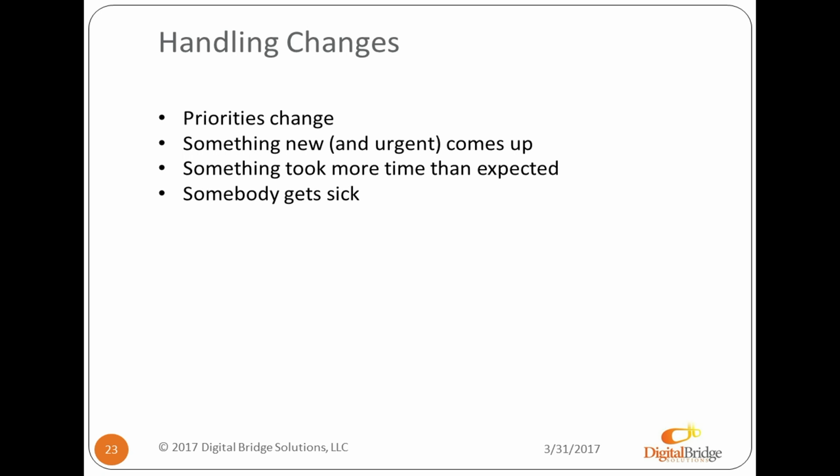Handling changes. Difficult for our organization, just like any others, but we have a process for that. So sometimes priorities change, which we touched on already, or maybe there's an outage on one of our client sites, or maybe that launch you had scheduled for Wednesday took an extra 2 hours, or somebody gets sick. There's an impact to each one of these changes. And from a PM standpoint, you need to keep all the boards in mind and know how, if something has changed over here, that's going to impact resourcing and timeline for your other projects, which also means you need to know priority. This client, their week might be a little lighter, or maybe this resource has a lighter week next week. So you've got to be aware of who's available.